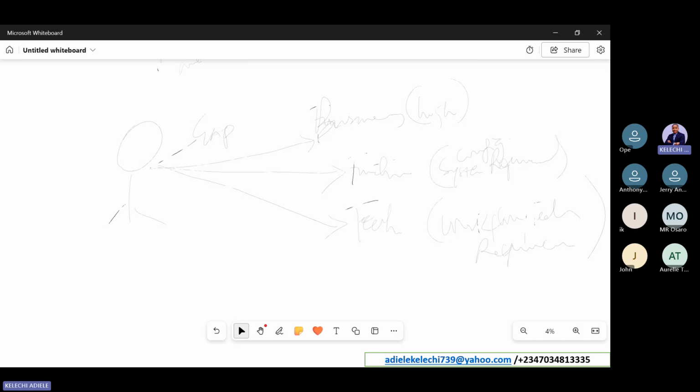And you have to document all this. The technical guy might tell the functional consultant to design what we call an FSD. The functional consultant will do an FSD and send it back to him. He's going to work on the workflow. Once he's done, he's going to test it, and then pass it back to the functional guy who will test. Once the functional guy tests and is okay, he'll pass it back to you as the solution is done.